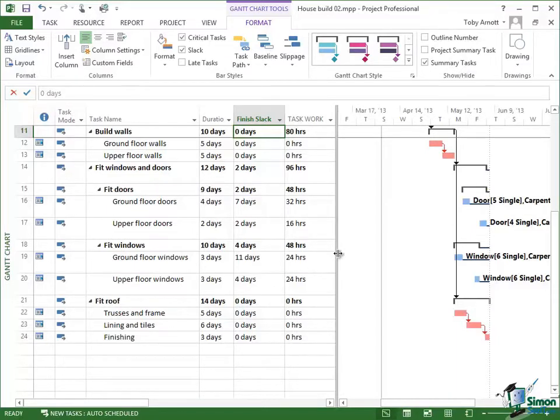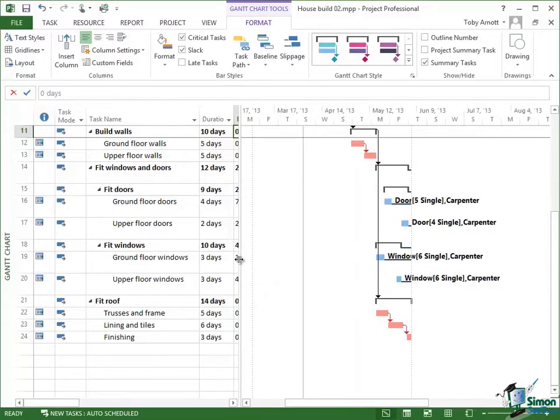So again, a very useful way to use the ability to customize the shown table to show the numbers that correspond to the bars in the bar chart there in the Gantt chart that show the available slack in each of those non-critical tasks.